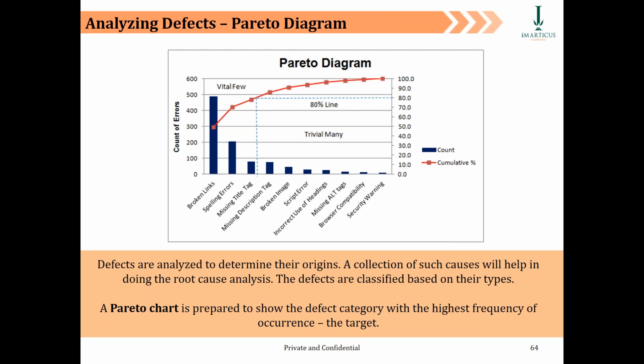So guys, typically you Scrum Masters end up using a Pareto chart a lot, because a Pareto chart gives us the defect category and the highest frequency of the errors coming from separate defect categories. Okay, so that is the count of errors which you get from different categories. So who generates the Pareto chart? Thanks to Jira, it gets generated by the tool itself.